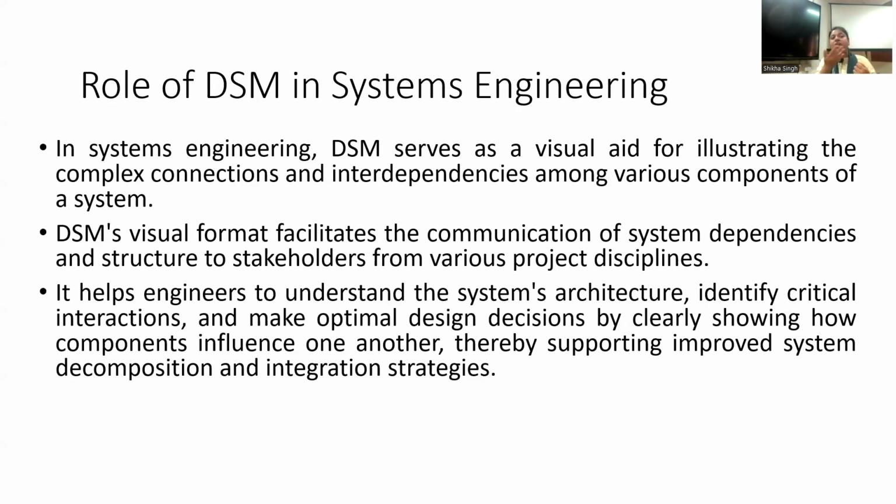If this logical arrangement is missed out, right? So what will I say? For the time being, just take it as an example that let us say X3 has been listed at the top of the work. That X3 you finish first, then later on somewhere X2 will be completed. So now just imagine, let us say X3 is completed, but it is dependent on X2. So later on, let us say after 1 week, when X2 is processed, the information which is working as an output, that is going as an input to X3.